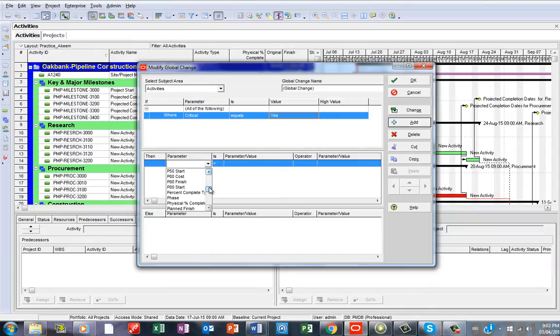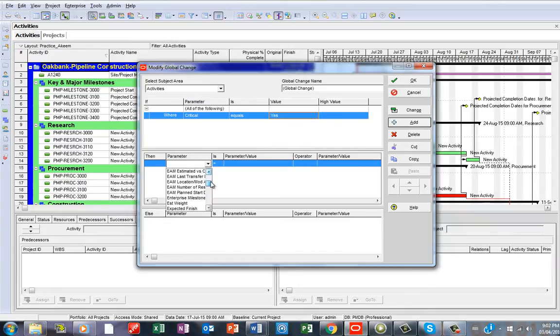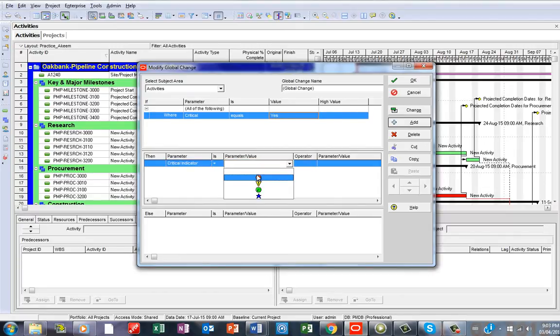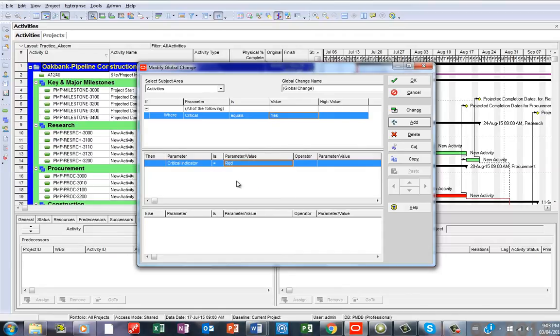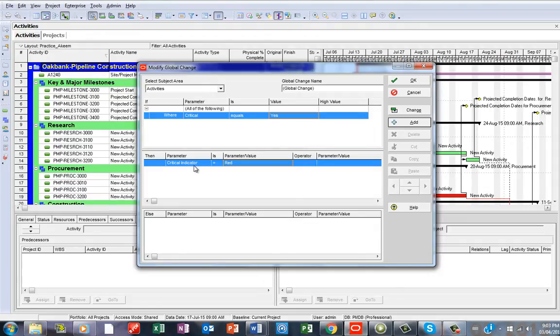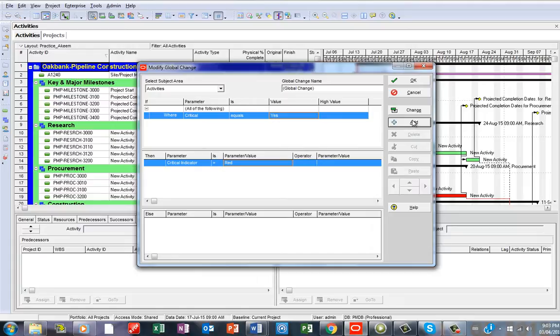You need to go here and say Critical Indicator, then you see Red. In the case the critical path, but in another way, Otherwise. So what this is saying is that if not on the critical path, if on the critical path indicate Red, and if otherwise, which means Otherwise.